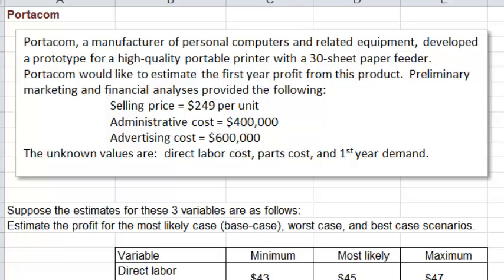The point of the simulation is being able to estimate profit when you don't have all the data. When you don't know one right answer, what you do is come up with three possible answers — like in project scheduling with three time estimates for each activity. If you come up with a single value forecast, your number will probably be wrong. But if you come up with a range of possible values, there is a good chance the right answer is somewhere in that range. So here, for each unknown variable, we have three values: the minimum value, the maximum possible value, and the most likely value.